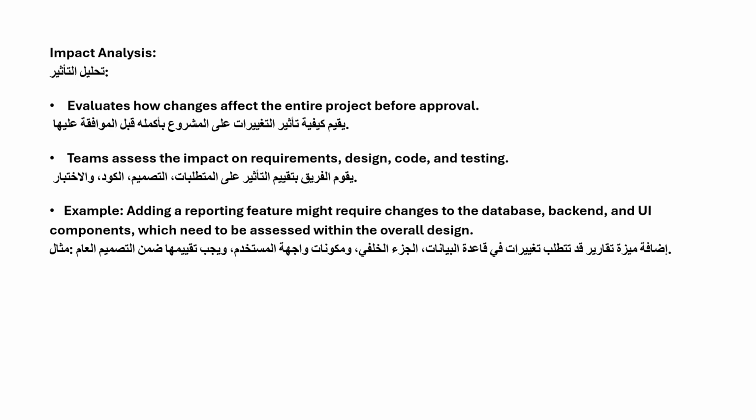The change control board usually asks the project manager to do some analysis. They need to evaluate how big the impact is. If we are going to add this requirement or change this requirement, what is it going to impact? Is the timeline for the project going to be longer? Do we need more money because we need to add people to write those requirements, etc.? So we have to do a lot of analysis here so that we can tell the customer what to do.